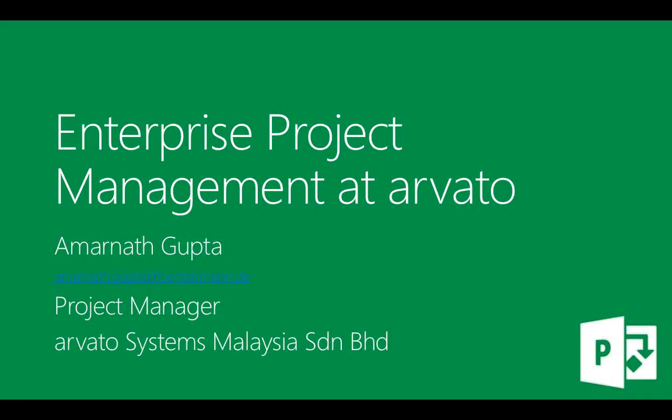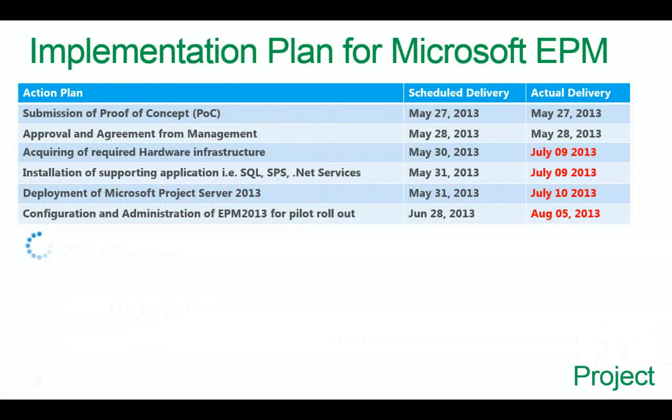All right. So I'm taking you through my first slide, which is basically giving our schedule. We can see the project got started on May 27, as you had given your green signal on May 26. After getting the approval from Queenie on May 28, we got delayed by almost 2 months because we could not obtain infrastructure from the IT team.